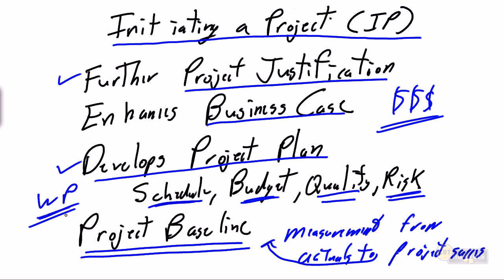This work package to interview the business community was supposed to take 5 days. What are the actuals? The actual took 4.5 days. Sounds pretty good. This work package to review the current situation analysis document was supposed to take 4 days. In fact, it took 5.3 days.